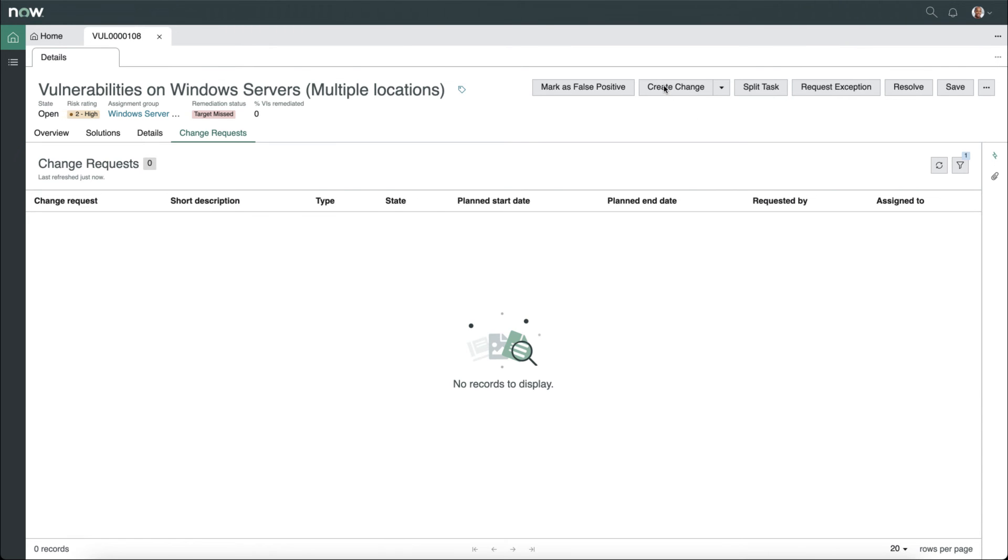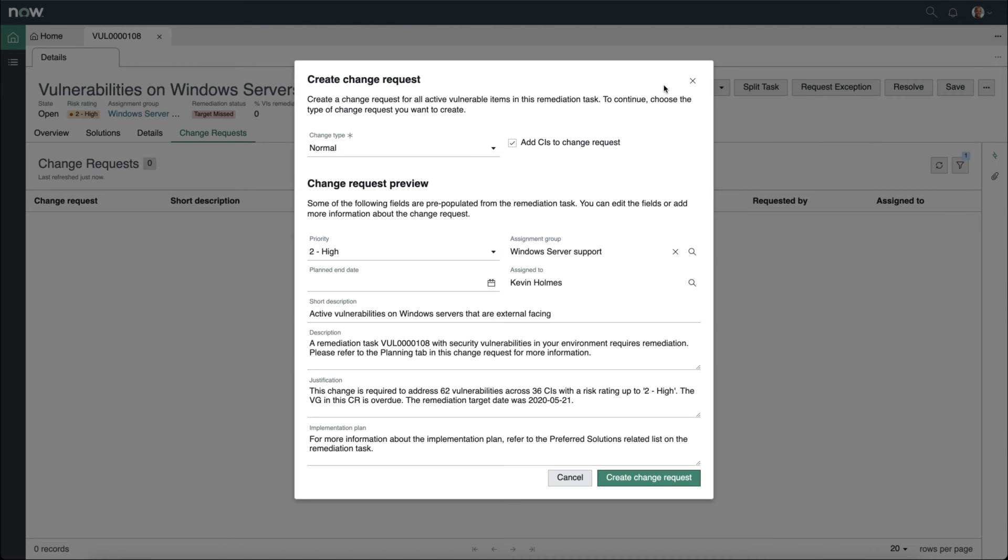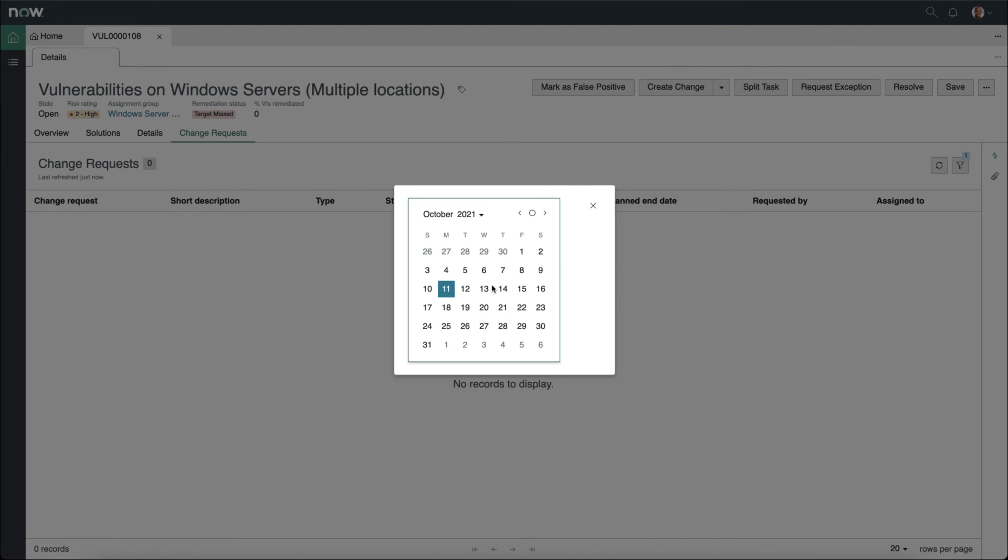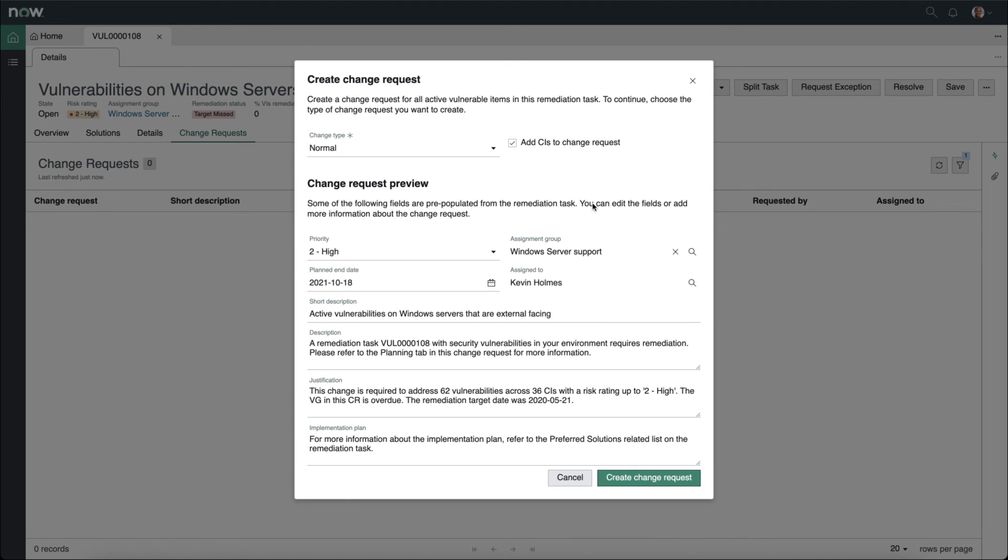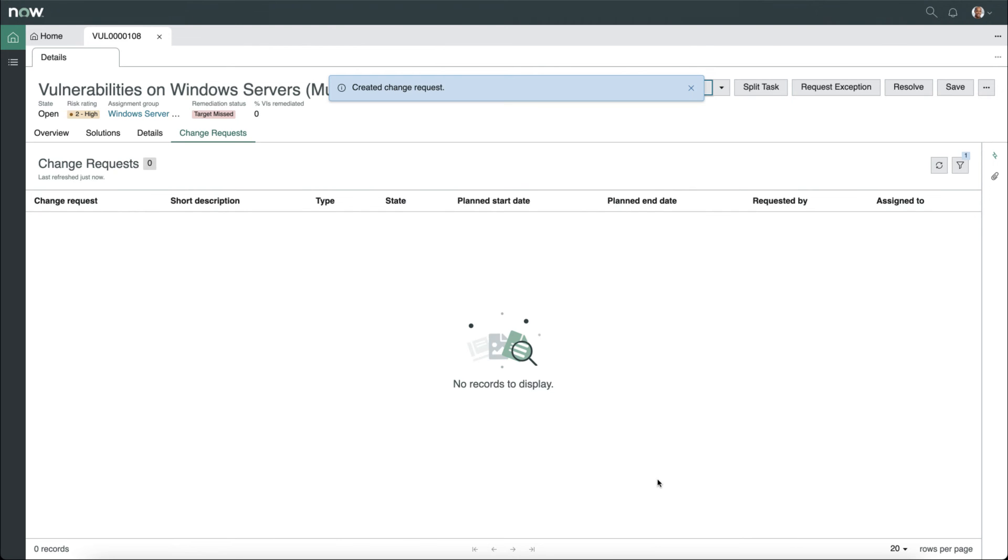In this case, let's create a new change request. We can set the change type to normal or emergency. We can automatically add the configuration items to the change request. We can set the priority, as well as the plan end date. In this case, we'll set it for a week from today. It will automatically pull in a short description, description, justification, and will automatically attach the preferred solutions to the change request when we click create change request.